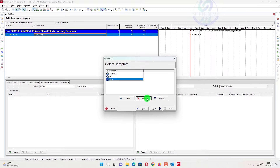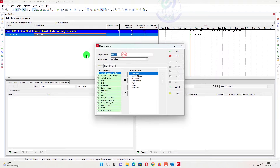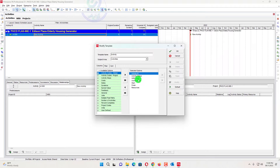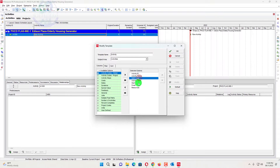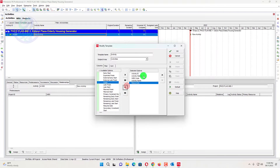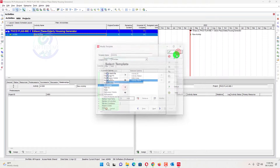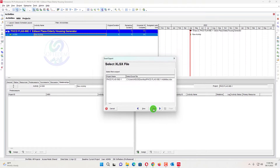We will create a new template. Add here — we will call it 'Activity.' We will add here only: Activity ID, Activity Status, WBS Code, and Activity Name. No other columns are needed. Click OK, then Next.